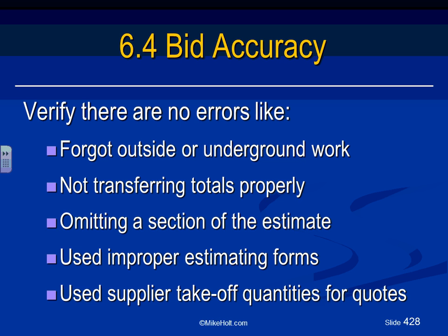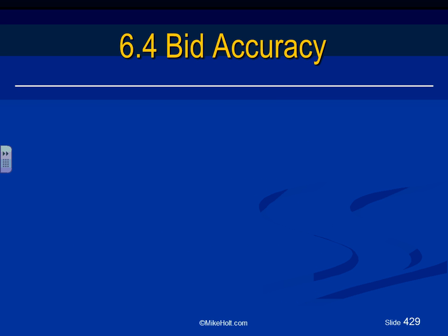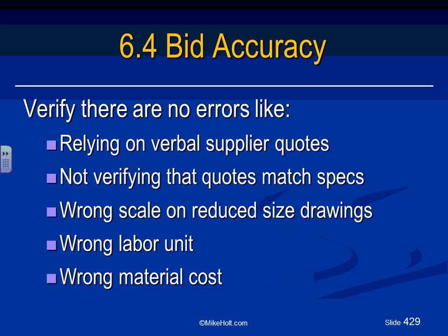Well, that's the job of the estimating software. Omitting sections of the estimate. Using improper estimating forms. Using supplier takeoff quantities for quotes. Supplier takeoff quantities, no, you need to do your own takeoff quantities. Relying on verbal supplier quotes.